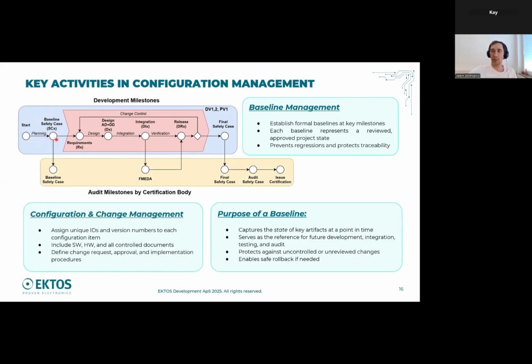And we recommend here to go with configuration management plan and functional safety management plan to demonstrate that you understand what functional safety is, and to get some feedback that we are on the right way and everything is okay, or what we have to improve. And baseline here is a set of all documents that you produce here and that are under configuration management.